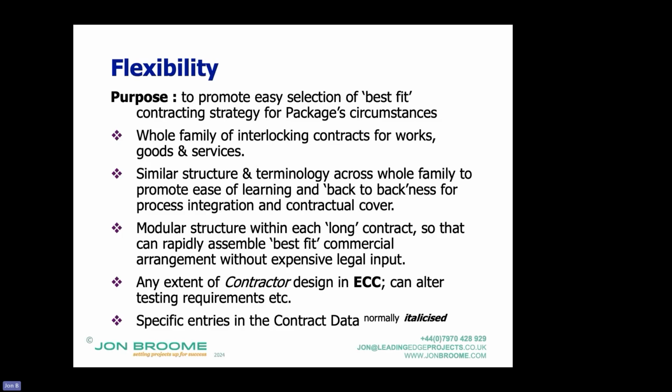I know some contracts where they've highlighted wearing course for roads, etc., as 5 years, because that's the design life for the traffic. So there's a lot of flexibility which you can write into that contract data. So when we look at the main options, when we look at the secondary options, we'll also be looking at what's in the contract data and how you put that into effect.